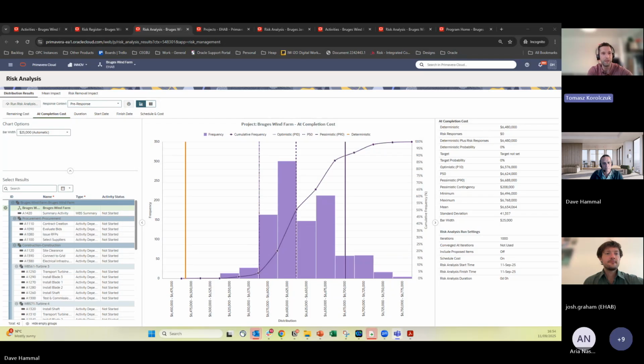But when it was raining for some time, this cumulative impact of the rain would turn the soil into mud to the point that even the 4x4 trucks could not get by, and that would cause another set of issues. So in fact, the same weather condition, rain, can cause two completely different sets of consequences.